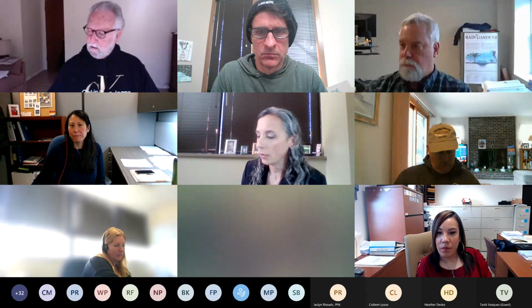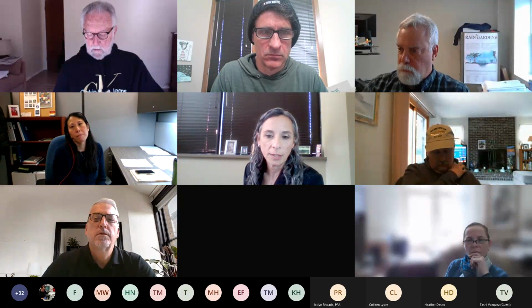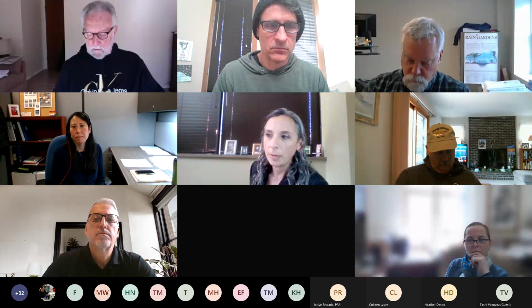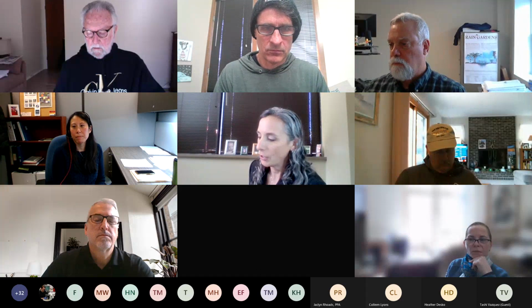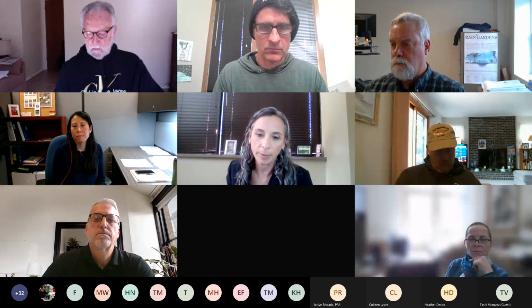Yes, I just want to reiterate that for the advance payment, it would be 90% at the most, because you need to reserve that 10%. I don't know if that was the question, but we have to keep that 10% until the final deliverables are there.